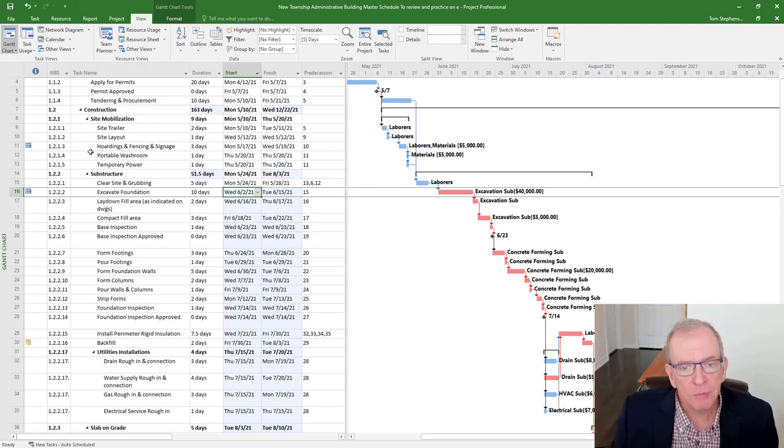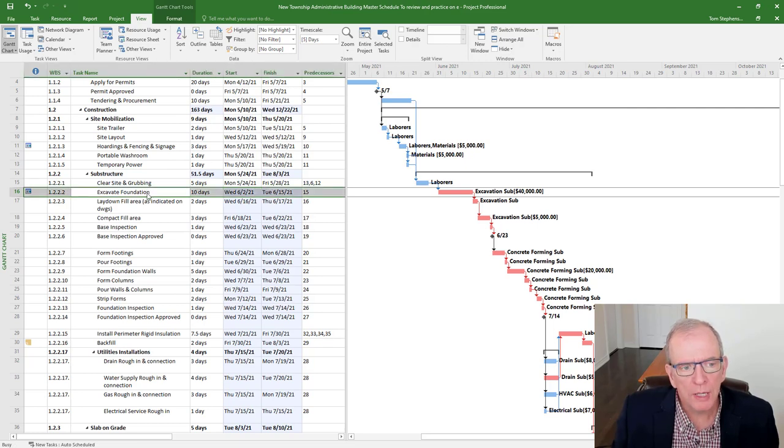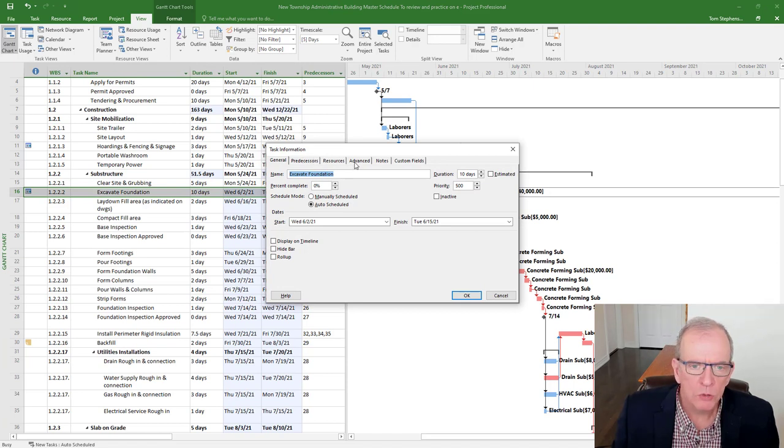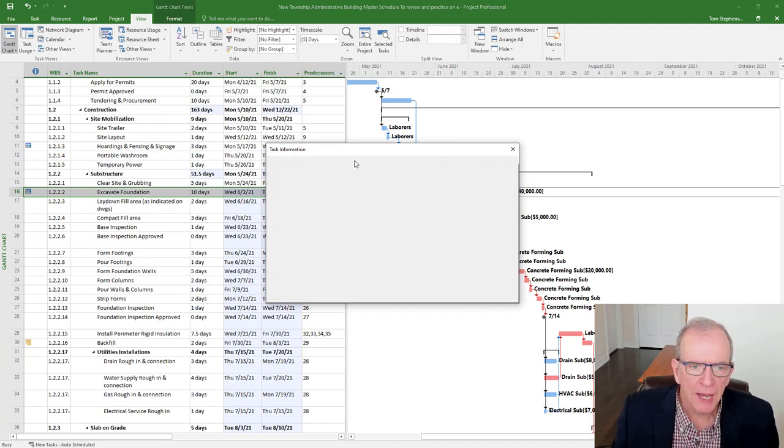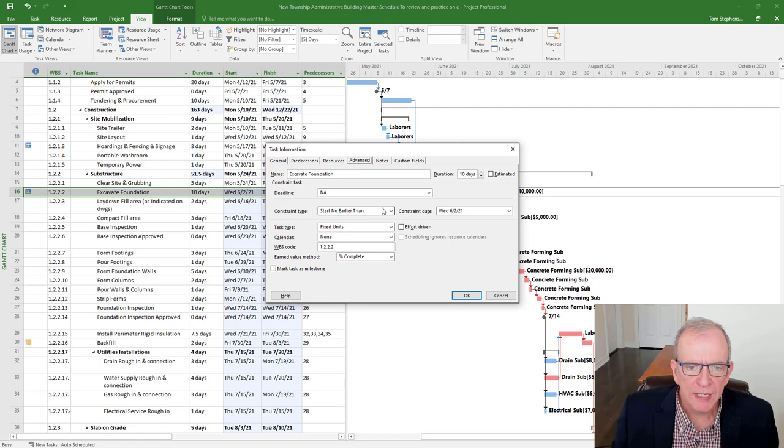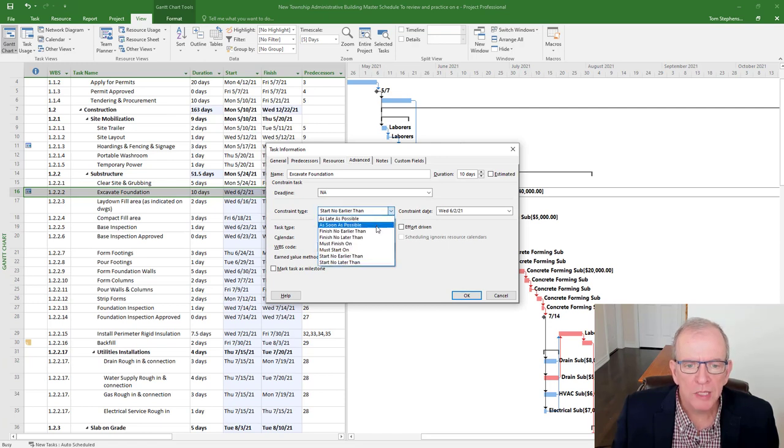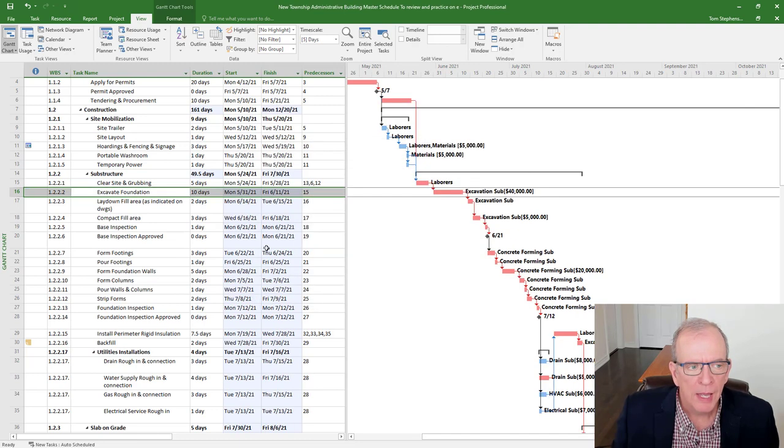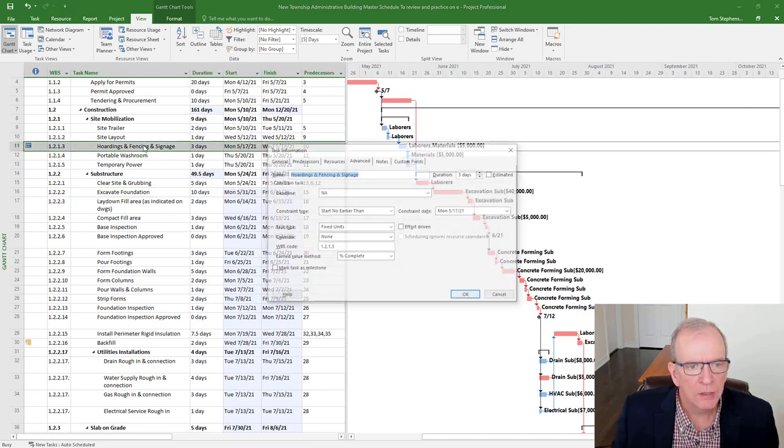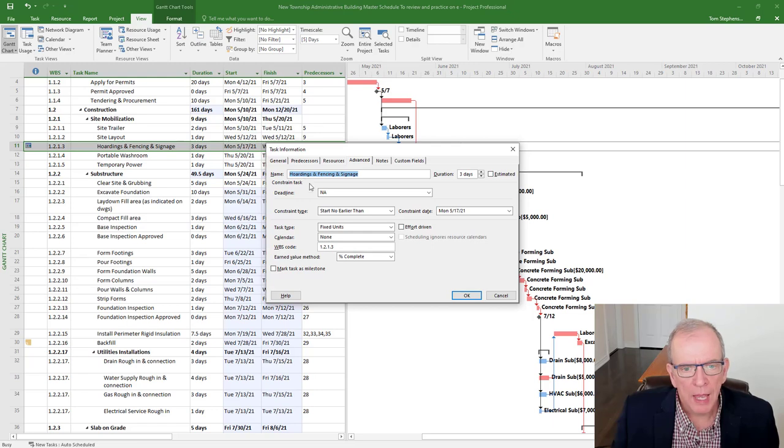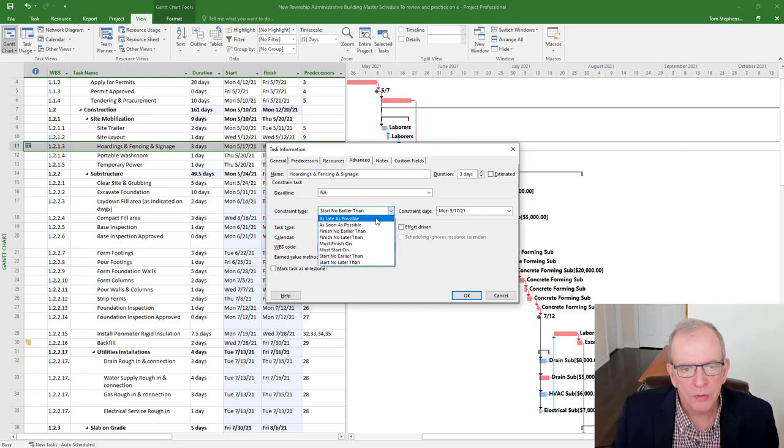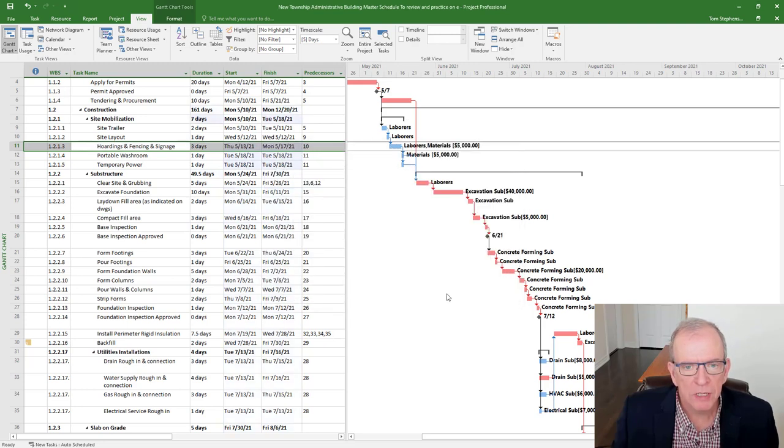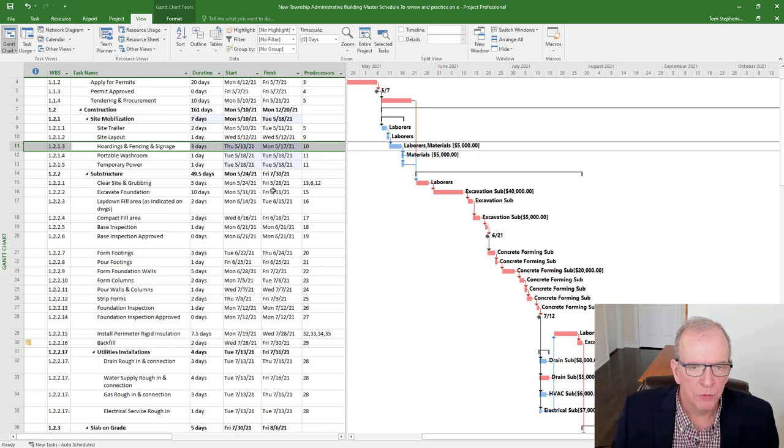Now, fortunately, if you have some constraints, they're easy enough to remove. You double click on the actual activity, brings up the task information box, go to the advanced tab, and see where it says constraint type, as soon as possible is the default, that's the same as no constraint, click okay, and that will disappear. You can see there's a whole bunch of other constraints that can be placed on these activities, put it there, and that allows for it to move backwards.